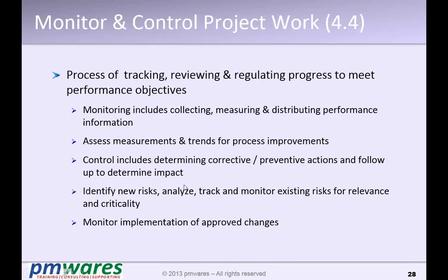Okay, and so next, when you are doing project execution, at the same time you also have to continuously monitor and control the project. And monitoring and controlling the project means comparing the performance data with the plan data, seeing if there is any variance, and if you find a variance, act for the correction. So we take corrective measures.